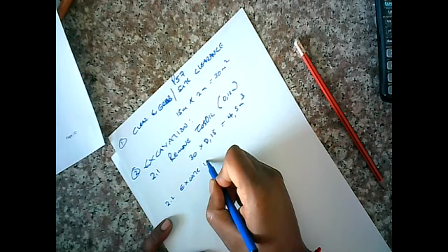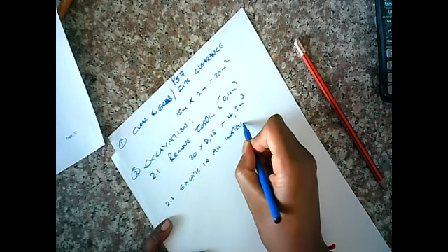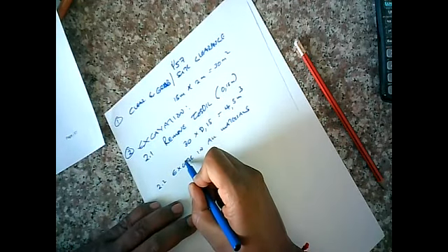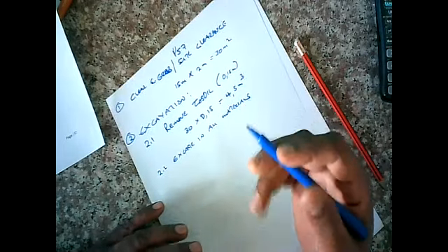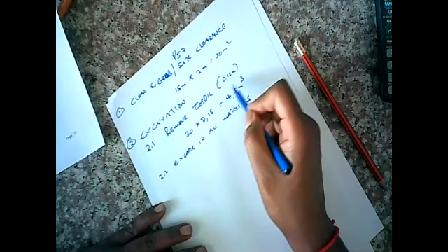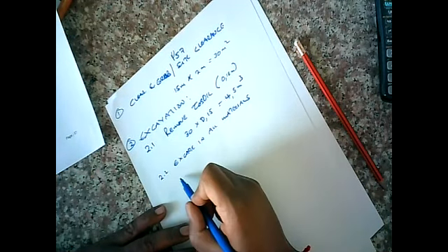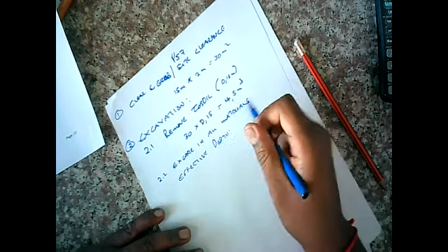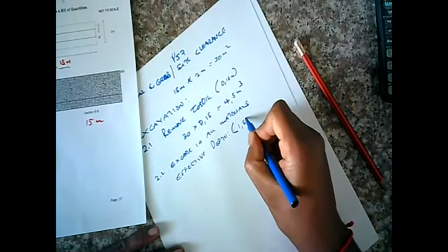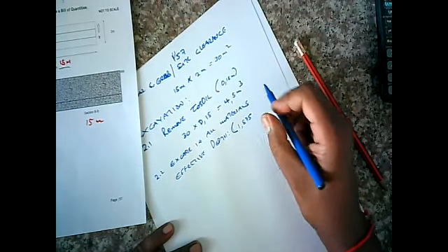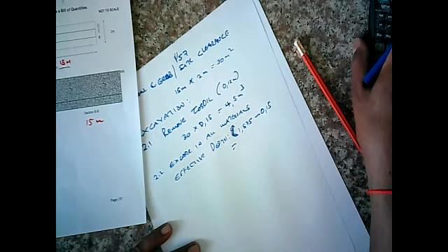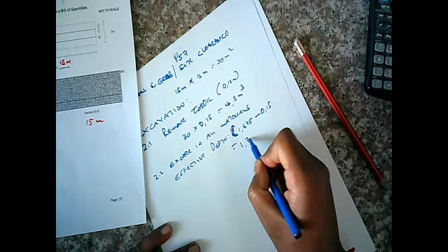2.2, excavate in all materials. Before we do that, what is our new effective depth? What is our effective depth once we've applied this condition? Right, so effective depth is equal to 1.85 or 1.875, subtract 0.15, is equal to 1.70 meters.